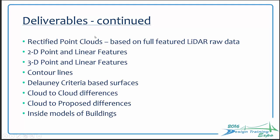Let's talk about deliverables: rectified point clouds based on full-featured LiDAR raw data. A word of advice — whether you're using terrestrial, mobile, or aerial LiDAR — my general recommendation is that you have the person doing the capture rectify the clouds. For example, if you're doing multi-pass lanes down a highway, by default they may not sew together perfectly lane to lane on the Z elevation. Get the vendor to tie these things down so when you get the data it's extremely tight — they need to know how to use the right kind of control and the right points to sew it together.